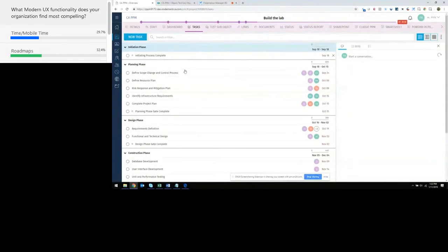Yep. Okay, cool. So the difference between to-dos and tasks, right? Before, if you were building out an entire work breakdown structure, you may have some tasks on there that you want to capture because they're important, but not necessarily important enough for people to track time at that detailed level. But you still wanted to make note of them and assign someone to them.